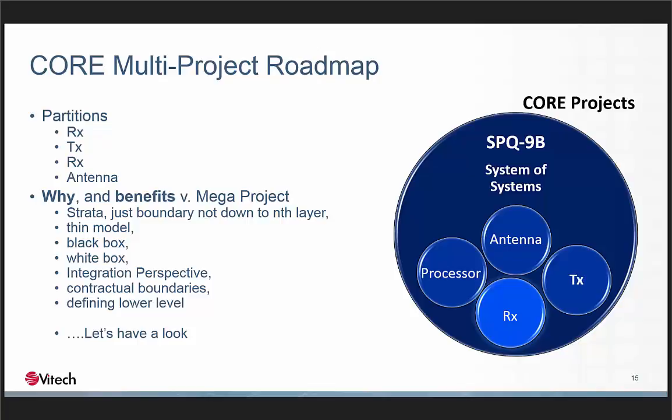Another aspect that has very little to do with engineering is the contractual boundary. If the contract officer is going to go off and procure an antenna system, they need to have the information standalone, so that if the winning supplier delivers their equipment, how do we know that it's been satisfactorily designed, tested, and that it performs the mission as it's prescribed to do? So what we're professing and working with Crane is that they'll be able to issue RFPs down to subsystem and even lower levels because they know what the information is.